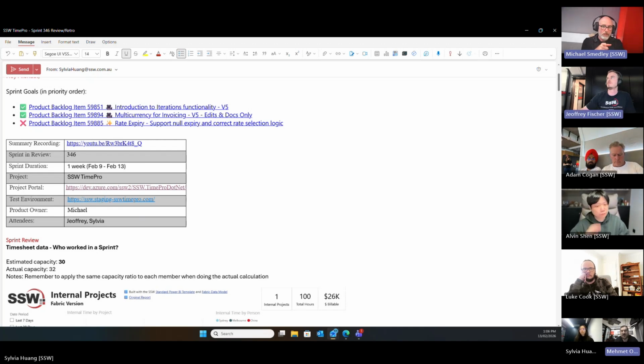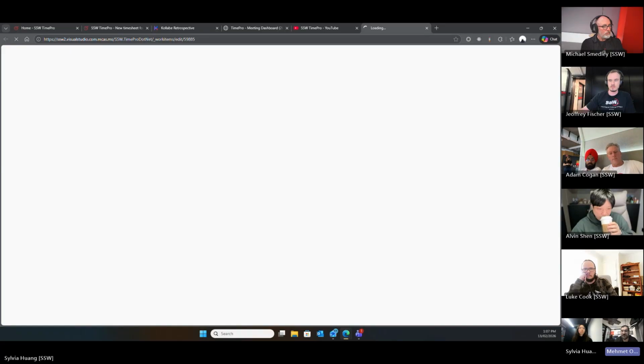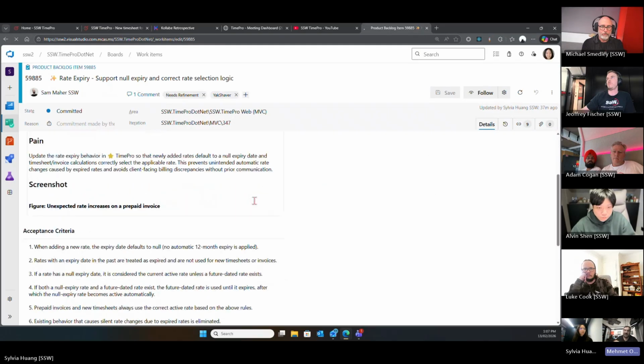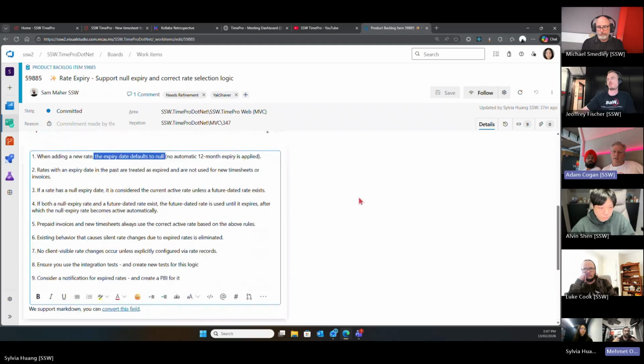Yeah, look, I think the thing is that someone can record a React-Shape video and they can request whatever they like. But I come back to if the team is doing, and I'm going to say the magic word here, Adam, if the team is doing refinement, during refinement this stuff should come out in the wash. And you'd say, well, 1, that's dumb, we're not going to do that. Or we're going to do it, but with these revisions. And in the AC, it would say we've revised it from null to, I don't know, an expiry date that goes out 2 years or a notification or whatever. During refinement, that sort of stuff will wash itself out.